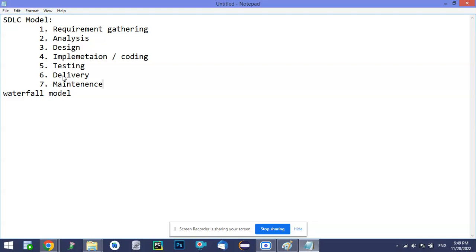So these are the 7 steps that project development generally includes. First one, requirements gathering. After requirements gathering, we get a document generally called the BRS, that is the business requirement specification. And after analysis, which as I mentioned is a complete understanding or a kind of discussion with the team about what is going on and what we are planning to do, we get the SRS, software requirement specification. And after that, design. This is what I told you, templates or diagrams, a pictorial representation of what we are going to do in the project.